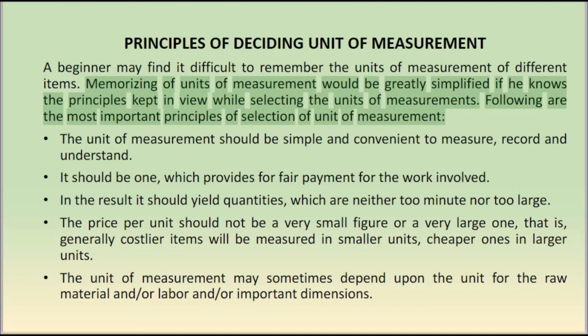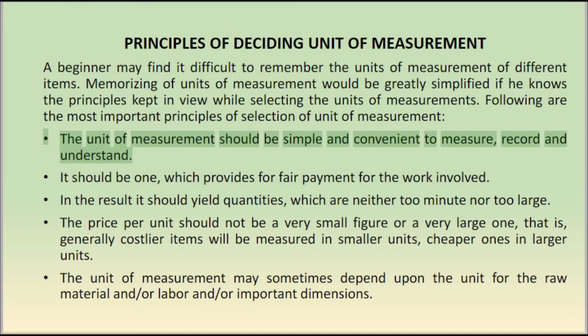The unit of measurement should be simple and convenient to measure, record and understand. It should be one which provides for fair payment for the work involved. In the result it should yield quantities, which are neither too minute nor too large.